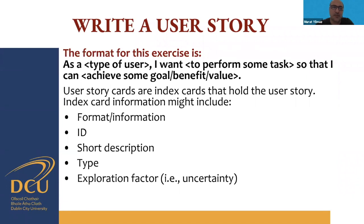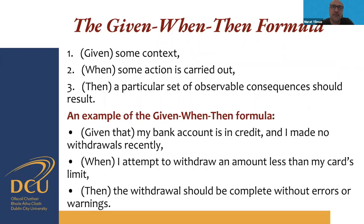When writing a user story, the format is: as a type of user, I want to perform some task so that I can achieve some goal or value. User story cards are index cards holding information such as ID, short description, type, and exploration factor — representing uncertainty about whether something will be a problem during development. Another format is given/when/then: given some context, when some action is carried out, then a particular set of observable consequences should result. For example: given my bank account is in credit and I made no withdrawals recently, when I attempt to withdraw an amount less than my card's limit, then the withdrawal should complete without errors or warnings.